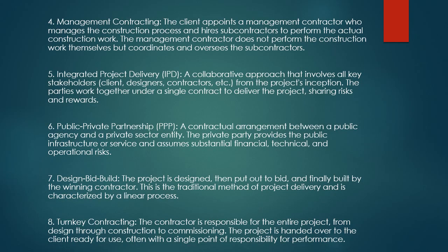Number 4, management contracting. The client appoints a management contractor who manages the construction process and hires subcontractors to perform the actual construction work. The management contractor does not perform the construction work themselves but coordinates and oversees the subcontractors.